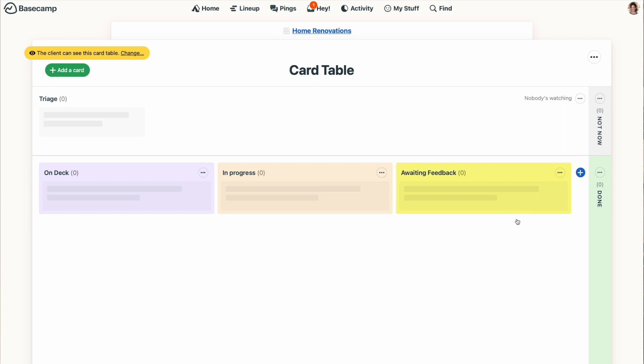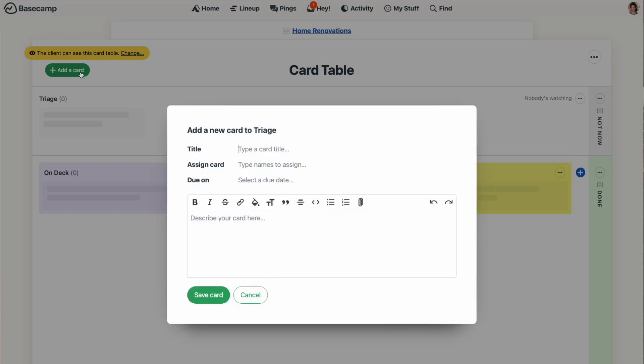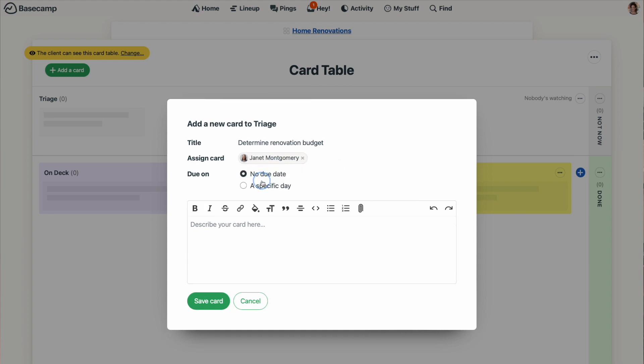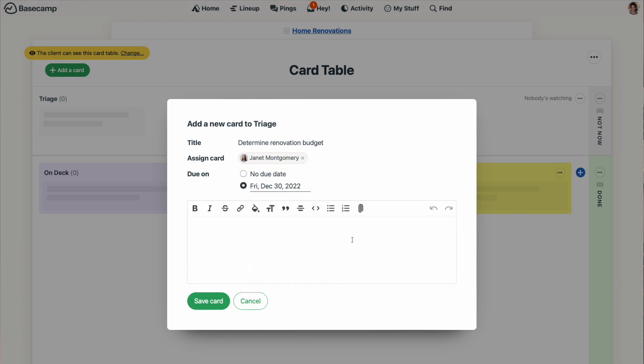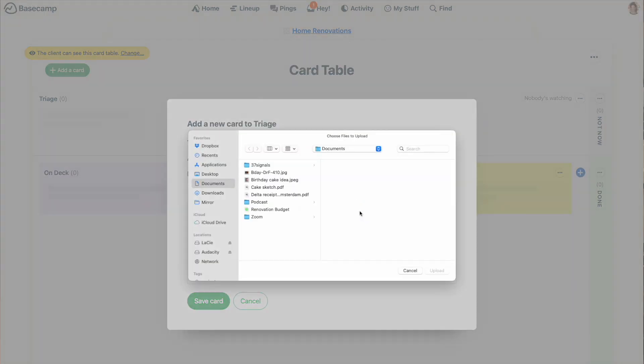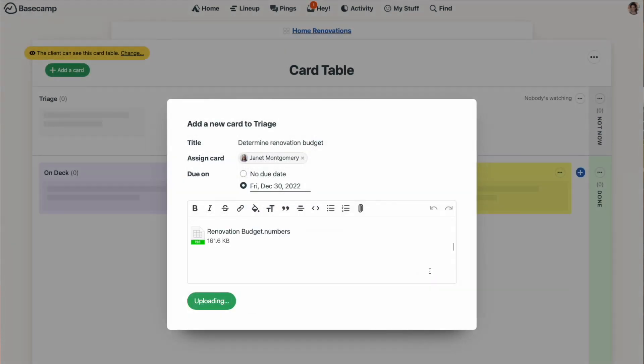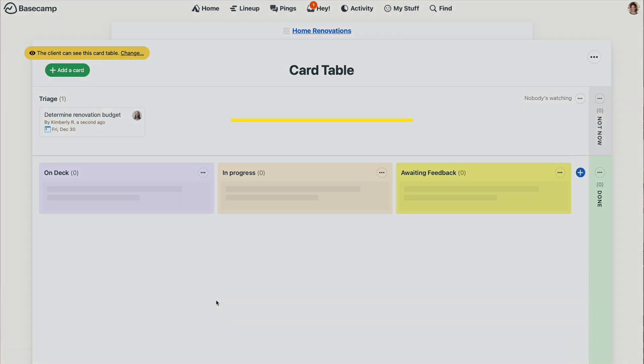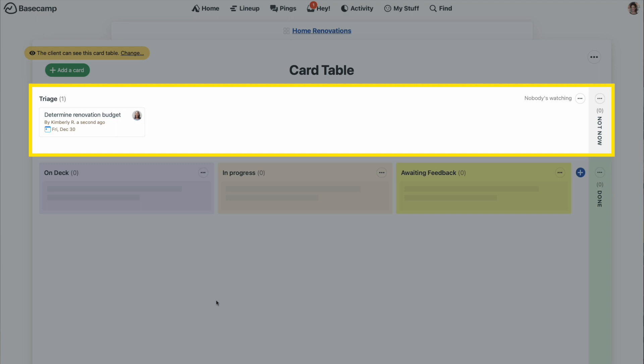How card table works is fairly simple. You'll add tasks as cards with the green add a card button. From here, you'll give the card a name, and if you want to assign the card to someone or give it a deadline, you can do that too. You can add a description and provide additional details including links or attachments. When you save a new card, it automatically goes into the triage section, and that's because when cards are in this section, they aren't yet in progress. It's kind of a holding area for tasks or ideas, so feel free to load up that triage section if you want to.